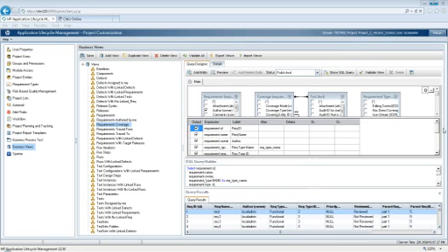Okay, next question, Andre. Is it best to handle interfaces, for example, other applications to integrate with, as requirements or tests or as sub-requirements? Oh, that's a good question. Tough one as well. You basically set up your requirement types from the get-go. If you start setting up requirement types in the middle of your project, you'll not end up very well, and very far.